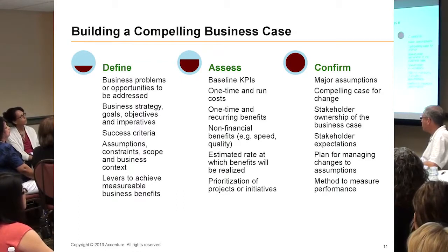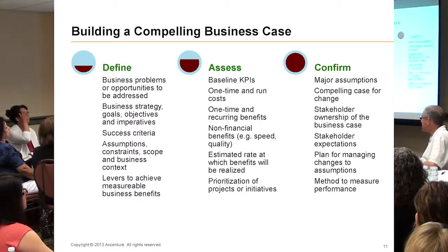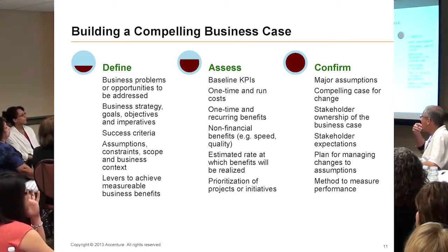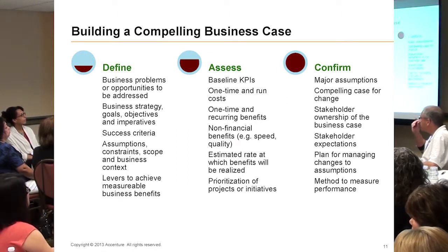So that's what you're trying to do in the business case. And what I wanted to emphasize here is not so much building that initial case, because if you have any experience with the FSR process, you're able to quantify what your one-time capital investment is going to be in terms of software, hardware, and fees to implement the software.